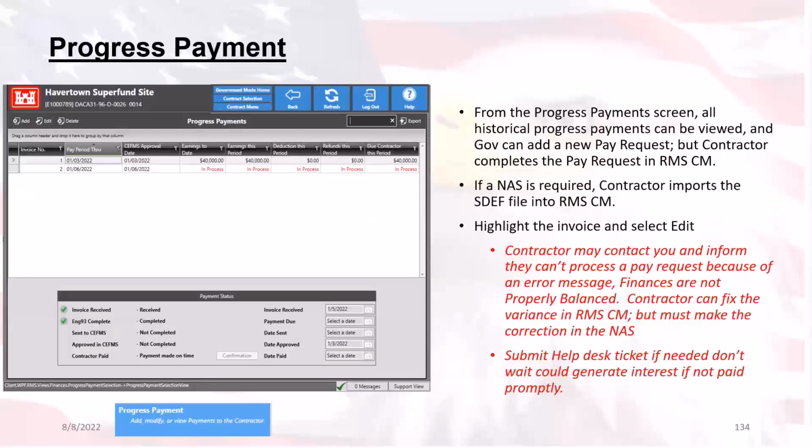If it's the first issue, then the contractor will need to update their scheduling software. That scheduling software can be pretty much anything: Primavera, Microsoft Project, anything, to include the changes with this new modification that has been applied to it. For those requirements, please refer to the contract documents.